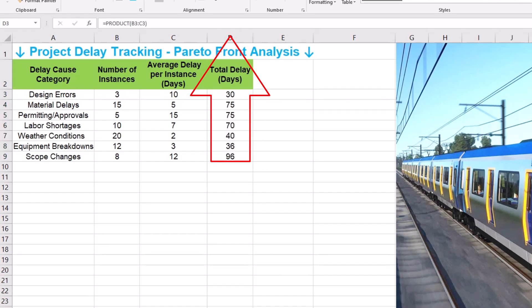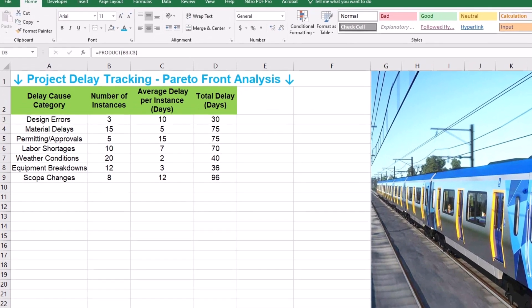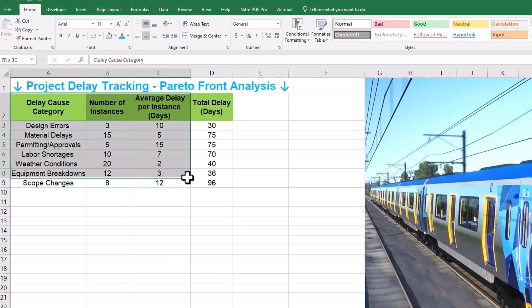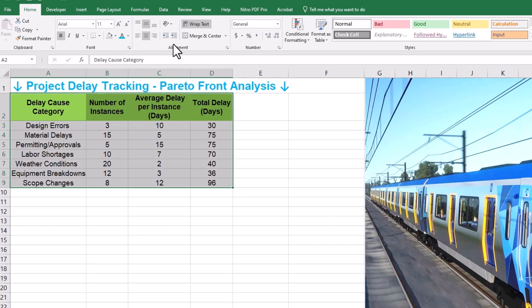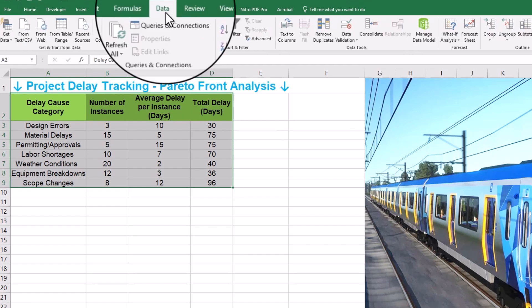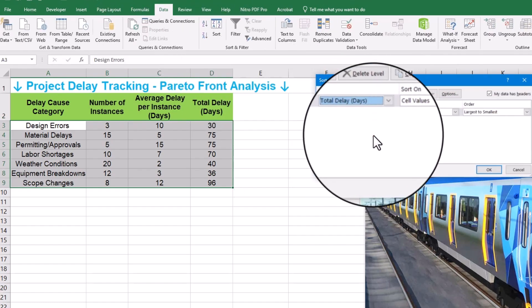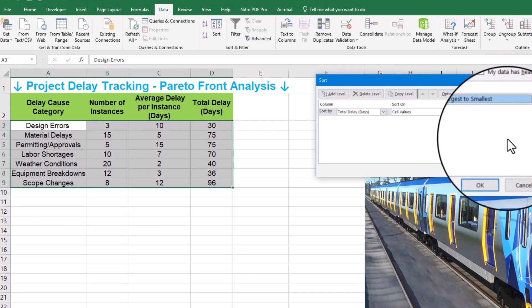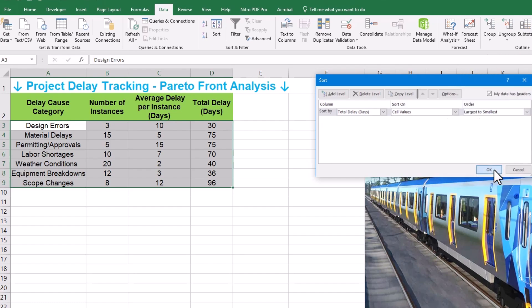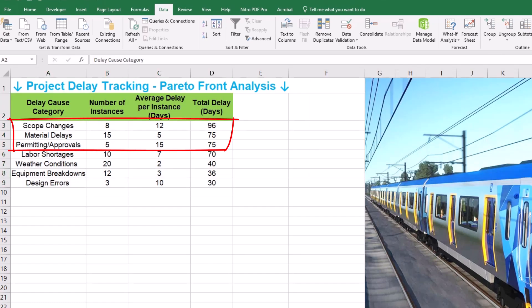Now we need to sort this data by impact. We want to see which delay causes contribute most to our overall project delay. Select your entire data table, go to the data tab in Excel and click sort. We are sorting by total delay with the order of largest to smallest. This rearranges our table, putting the delay categories with the biggest total delay at the top. This sorted order is the backbone to our Pareto front optimization.